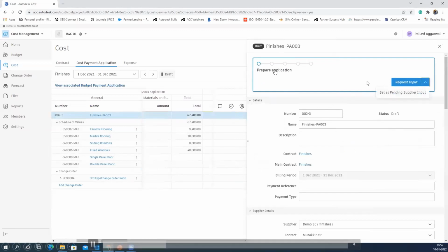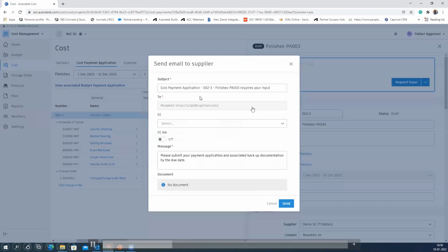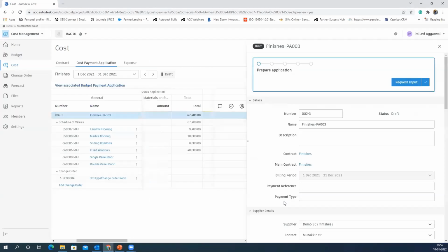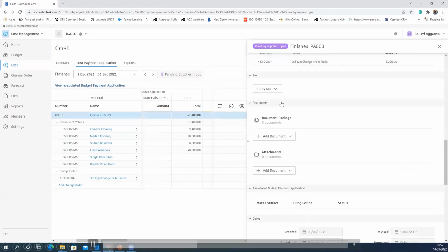And again, an extensive approval process. If we see here on top, from our contractors, information is first going to subcontractors. Subcontractors will fill and check the information, and then it will go back to the contractor and maybe to the PMC team or owners. In this phase, you can create an extensive approval workflow for your process and get the bills approved digitally.